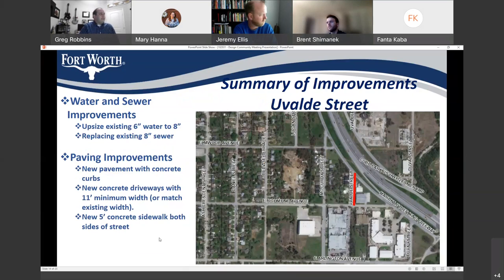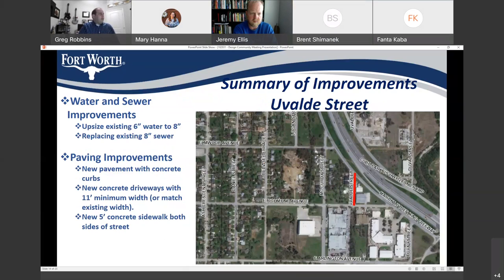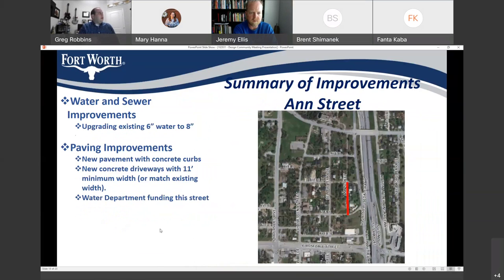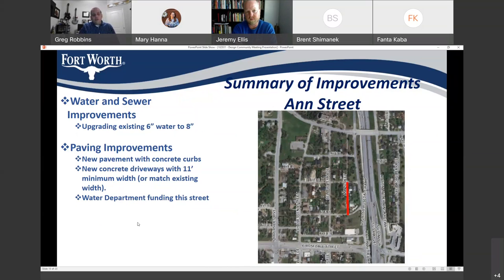Uvalde Street will be upsizing the existing 6-inch water to an 8-inch and also replacing the existing 8-inch sewer. New pavement, new concrete driveways, and new concrete sidewalk on both sides of the street. On Ann Street, we'll be upgrading the existing 6-inch water to an 8-inch, new pavement with concrete curbs, and new driveways replacing the existing ones. It's worth noting that Ann Street and the next one, Bellezee's, are being funded by the water department — not technically part of the 2022 bond, but included in this project.